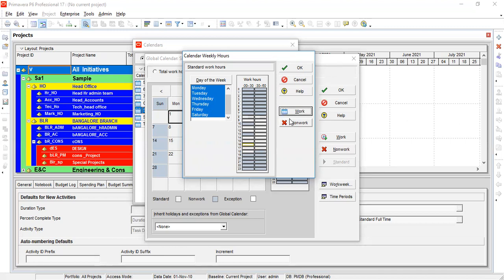No, you made it as non-work. Just you can see now, 8 o'clock the work starts. Made that as non-work. 8 to 10, 2 hours. 10 to 10:30 is non-working hour, some break. 10:30 to 1, another 2.5 hours. And then 1 to 1:30 break.